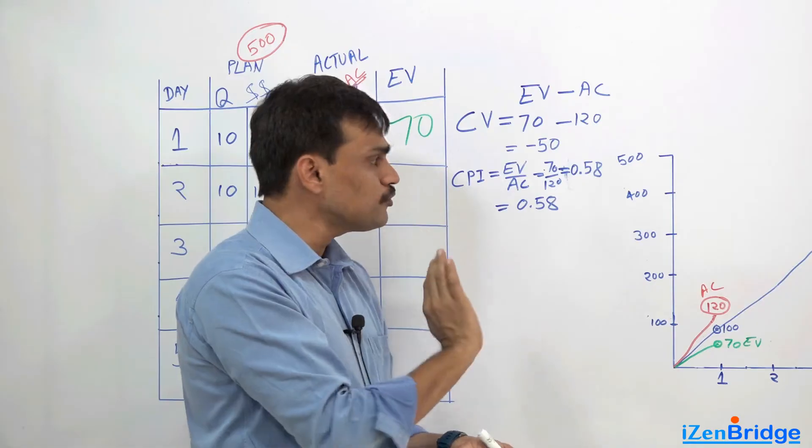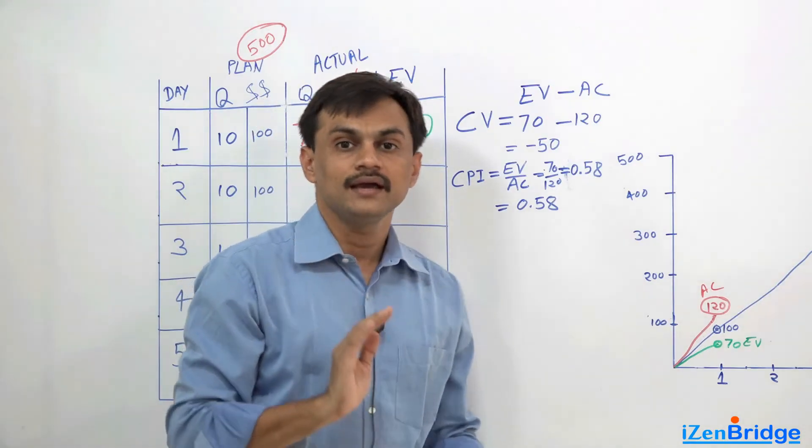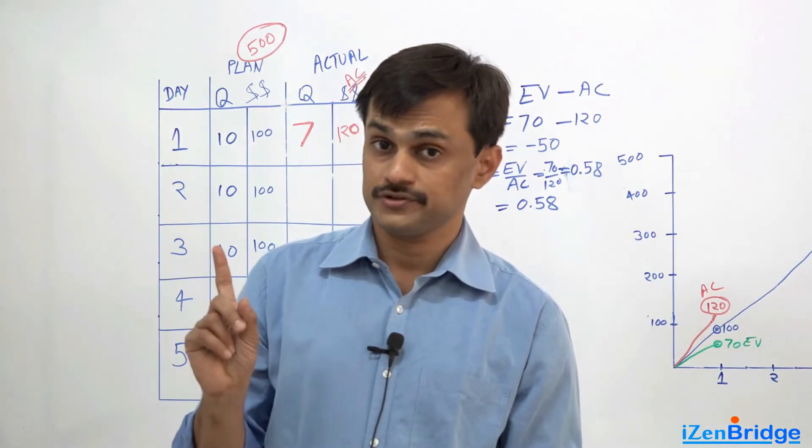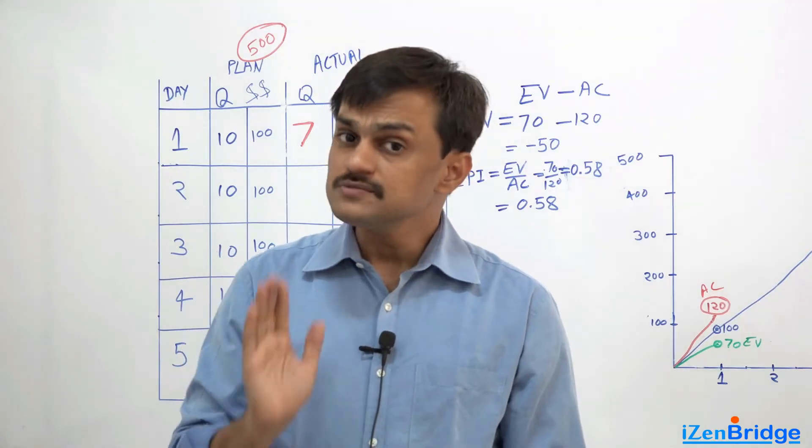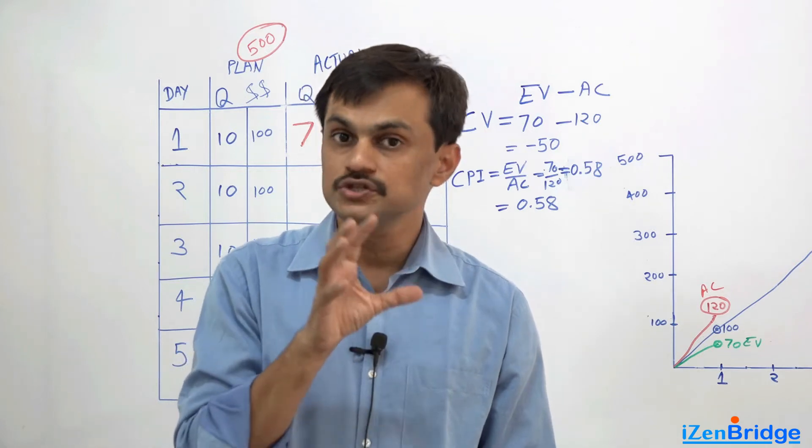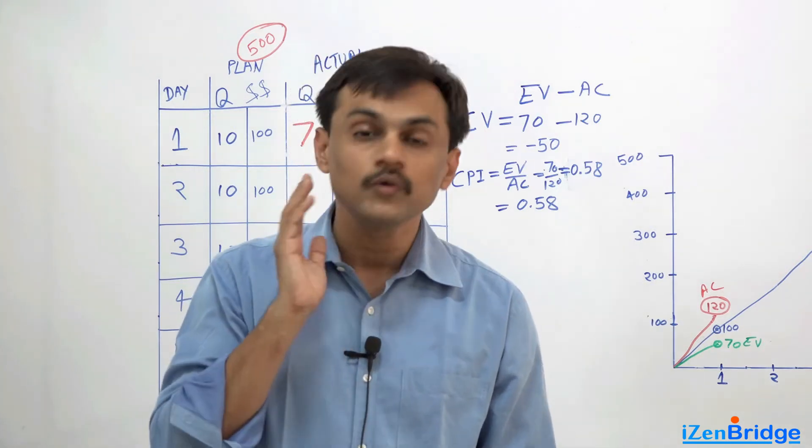So anything, if our cost performance index is less than 1, it shows inefficient utilization of our money as per budget. And if it is more than 1, it shows that we are doing far better as far as using our money than our budget.